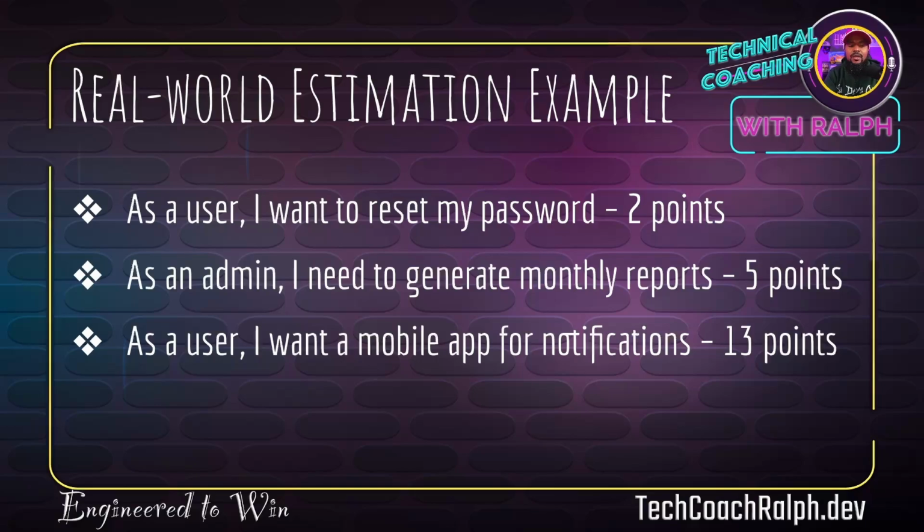2 points. So next up, as an admin, I need to generate monthly reports. So based on what's already set up, we can discuss it. Do we need to pull from different databases? Do we need to run some different SQL queries? But if the infrastructure is there, the team might talk about it and say, okay, compared to resetting the password, this might be a 5-point story.